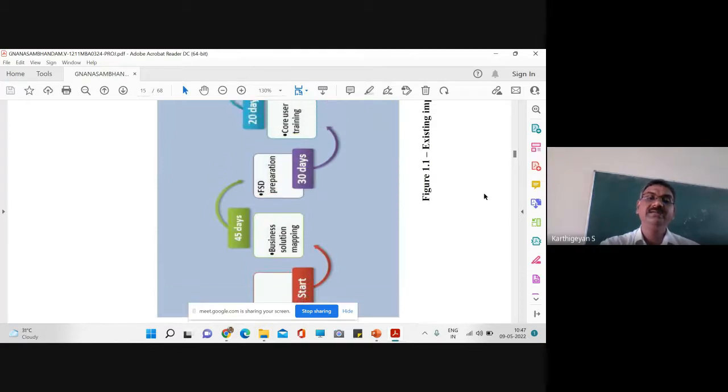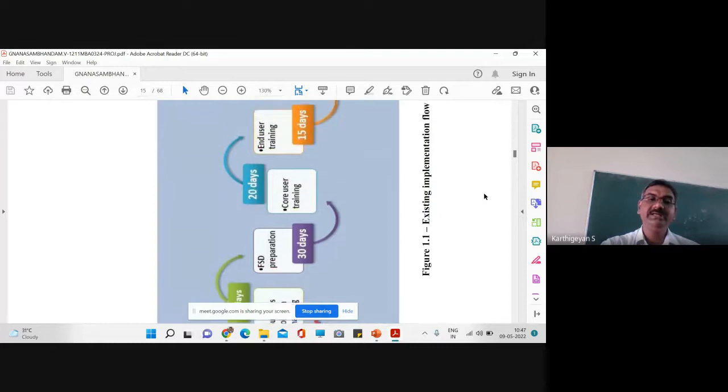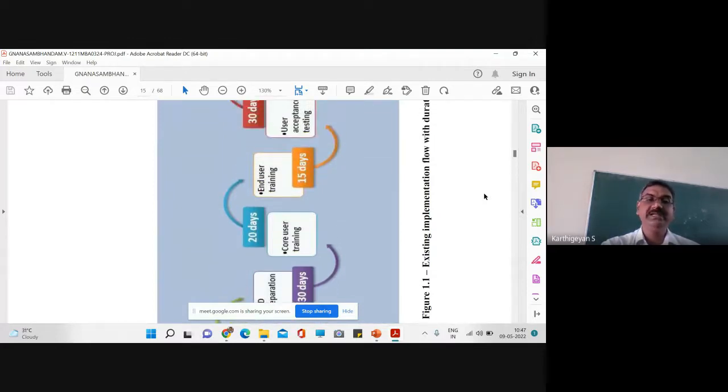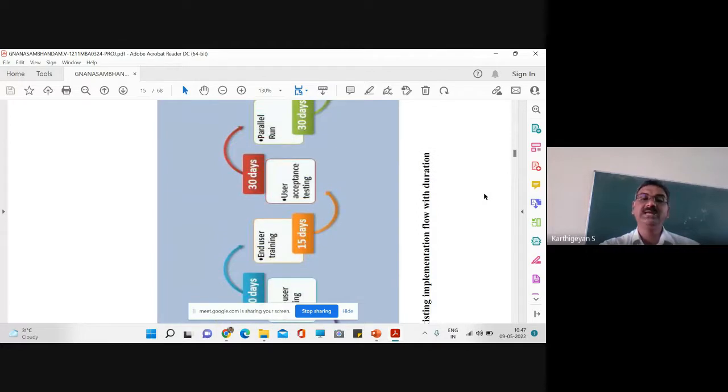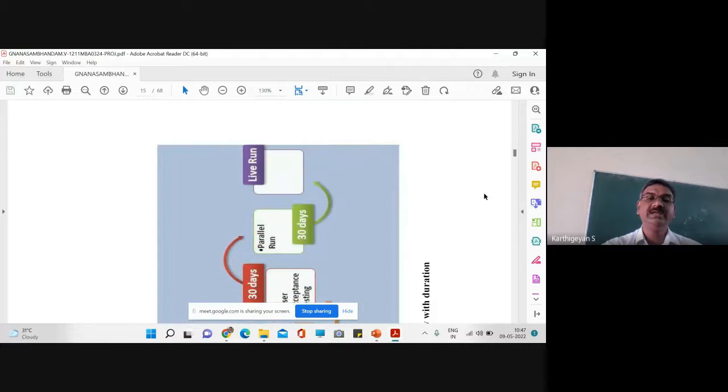Okay, and the next step is core user training requires 20 days, and the next step is end user training requires 15 days, and the next step user acceptance testing requires 30 days, and the parallel run, that is implementation process, is 30 days. So finally live run.